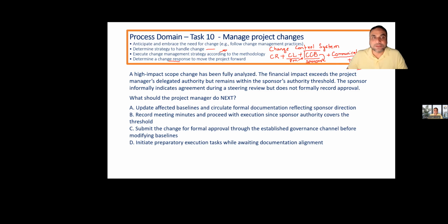In the adaptive mindset, what happens during the review meeting of the project? After the end of an iteration or a sprint, we have a review meeting. The purpose of the review meeting is to demonstrate what you have done and collect feedback on the requirements: new requirements, adjusted requirements. Those requirements go back to the artifact called the product backlog.